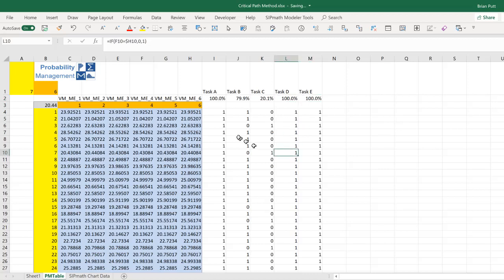So by simply taking the difference here of what it is without any epsilons and what it is with the epsilon, I can say whether the element is on the critical path. This is complex, but this is actually very simple relative to what you might try to do for an uncertain network in calculating it in the traditional ways.